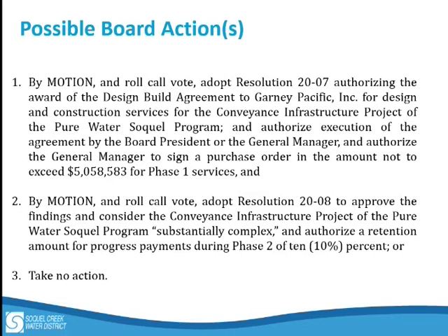Over 100 sheets on the design. They're cataloging over 600 potholes. And it is an extensive effort in order to have a smooth phase two and not have as many surprises. We're trying to do our homework up front so that we're not on the street longer than we need to. We know what we're going to get into before we get into it. There will be, of course, underground surprises, but for the ones that we know about, we're going to have a plan before we get there.